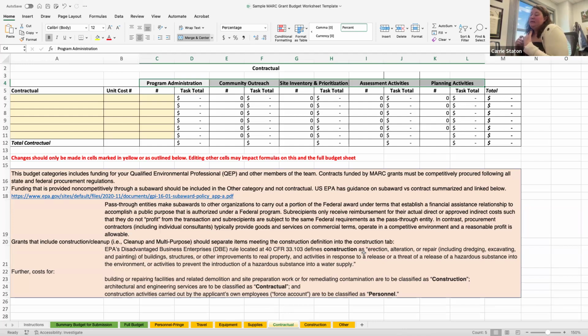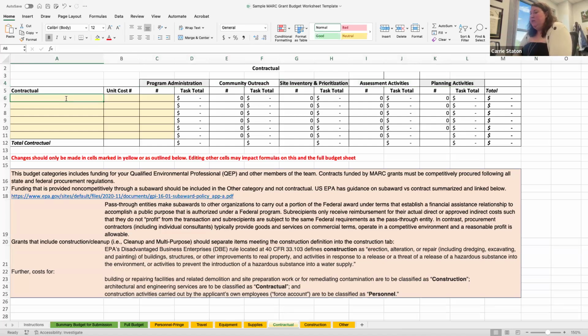I'm going to use some estimates for a phase 1 or a phase 2 based on the numbers that I have been seeing most recently when I made this grant. But you want to make sure that you're checking in your area, because when you explain your costs breakdown in your grant, you want to make sure that you have that detail there. All right, so we know we're going to do some phase 1 environmental site assessments. We know we're going to do some phase 2 environmental site assessments. We know we want to do a feasibility study, and that we want to do a reuse plan.